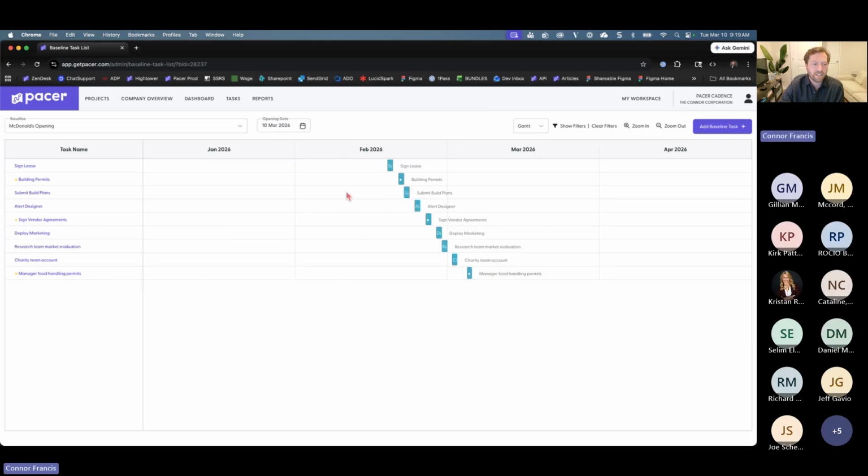And what I want to do actually is take all of my milestone tasks and connect them to the last task here. So I've set up one dependency and I'm going to set up this other one here and connect it to the last task. This is setting them up in the Gantt chart view. It's really fun and easy to just connect them like that. I can also double click on this line to break that connection. And if your tasks are due very close together, you can also zoom in and that will expand this window so that the tasks are a little bit more spread out. Makes it easier to click and drag on some items.